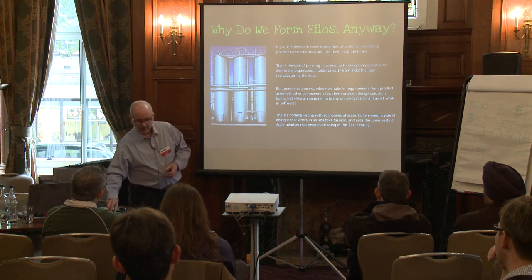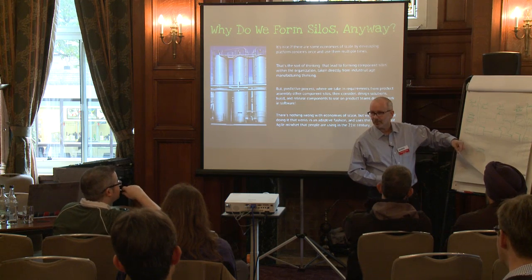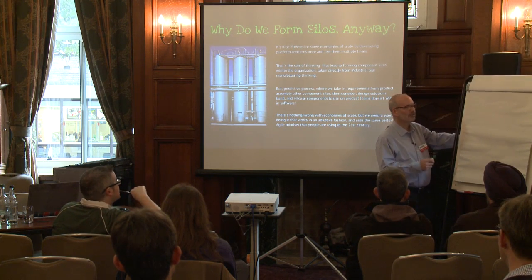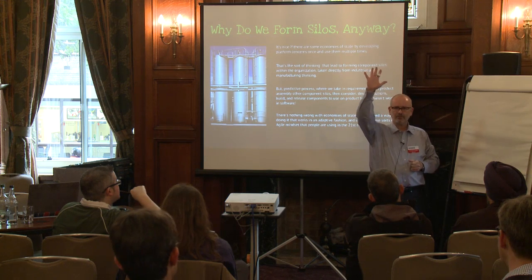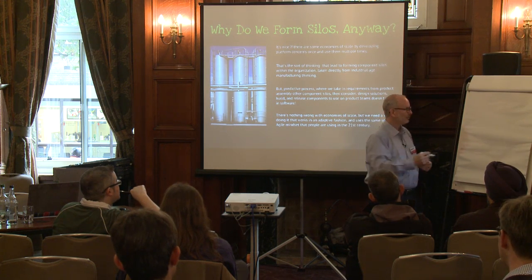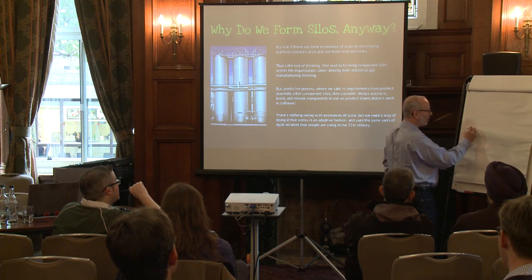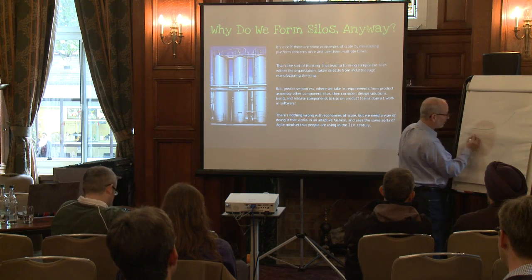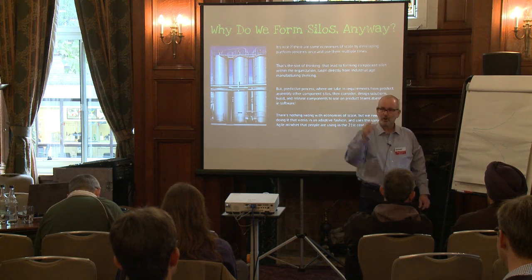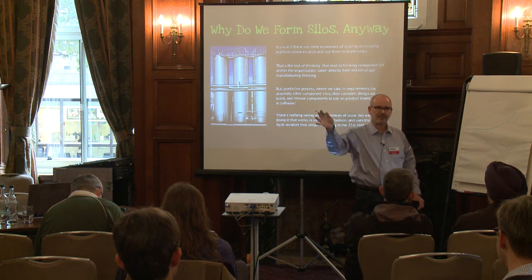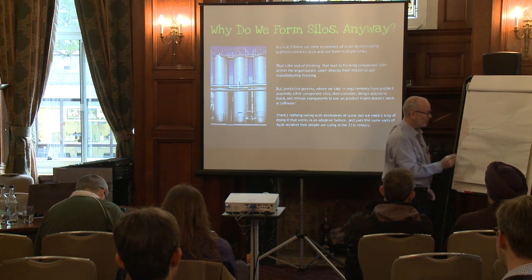The unknowns. We don't know the unknowns, right? Especially when we talk about estimation. How hard is it going to be to do something? How long will it take us? Right? And these date back to the typical sorts of things with like foreseeability, the cone of uncertainty, familiarity. Yes? Just for those that aren't, right? If this is time, our ability to estimate tails off quasi-exponentially, right? As time increases, our ability to understand what's going on outside at that time period gets hard. Okay, and it was first established back in the 60s when in the US they were doing their space